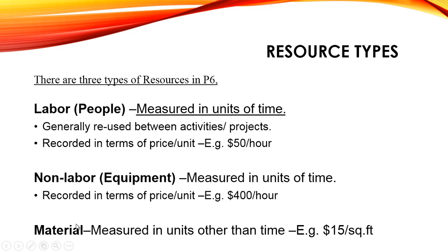Material is measured in units other than time. For example, if we use cement, then we will use bags. For sand, cubic feet. For crush, again cubic feet. Similarly for weight, maybe in kg or pounds. So the third type of resource is measured in units.